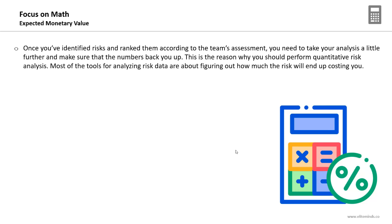In this lecture we will talk about risk management activities and the numerical analysis of risks using the concept of expected monetary value. Once you have identified the risks and ranked them using qualitative risk analysis, you need to take your analysis further. This process is the quantitative risk analysis, and it is optional — you only execute it for complex projects with identified risks that have a high probability or impact.